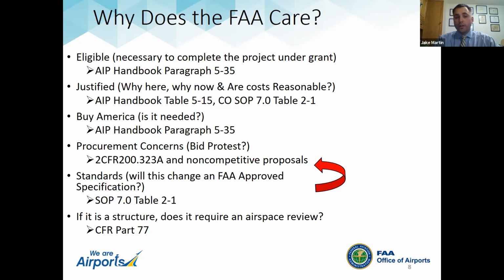Or potentially shifting construction schedules in excess of a year. If you shift within a 12-month window, that's pretty reasonable. But if you say, "Well, we're going to shift construction from summer of 2021 until summer of 2023," that could be another potential place where somebody could say, "I didn't bid the project in 2021 because I didn't have time in my schedule, but I would have had time in my schedule in 2023 had I known." It's a bit speculative, but our role again is just to advise you on some of the risk that goes with that.